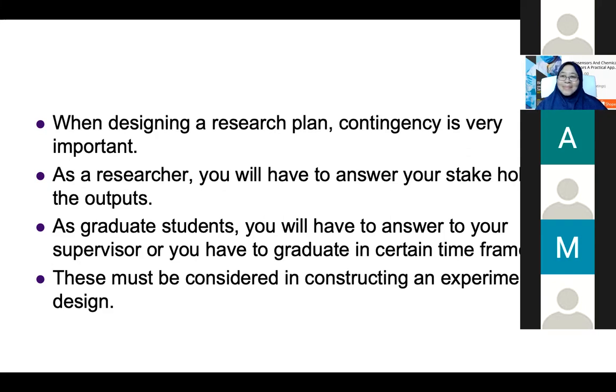Anyone? Related to your boss? The delay of chemicals. Yeah, that one is very common. The delay in chemicals arriving, especially in Malaysia, takes 3 months, sometimes 6 months to arrive. So if you think about this, you already know it's going to happen.